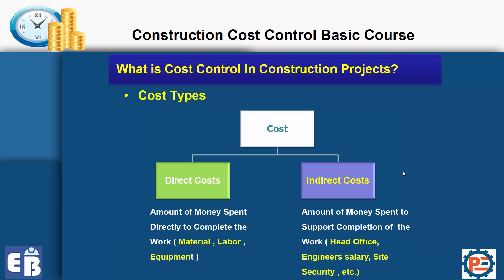So what are the costs? We have two types: direct cost and indirect cost. Direct cost is the amount of money spent directly to complete the work — like material, labor, and equipment, whatever is required to complete an activity. Indirect costs are the amount of money spent to support the completion of the work, like head office fees, engineers' salaries, site security, etc. You cannot load this indirect cost into one single activity.